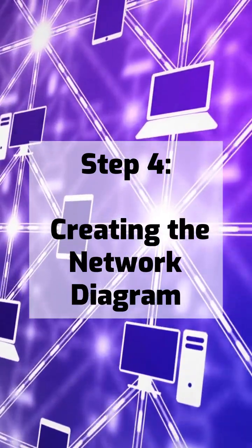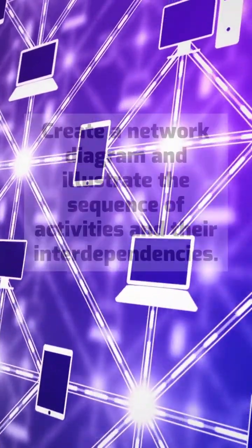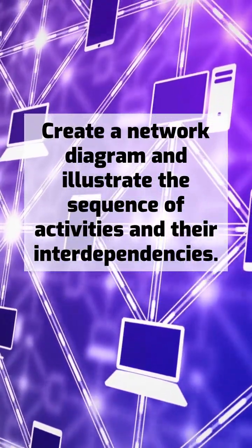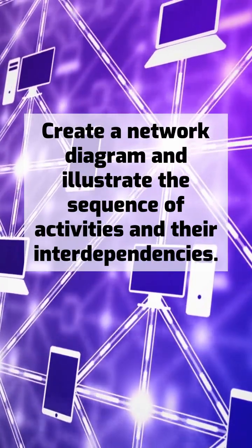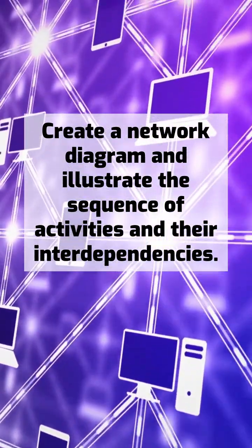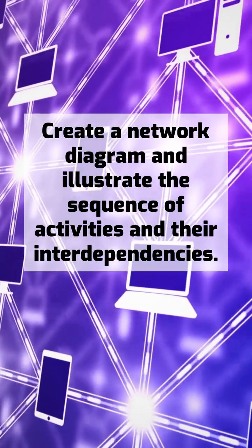Step 4. Creating the network diagram. Using the activity dependencies and estimated durations, create a network diagram. This diagram will illustrate the sequence of activities and their interdependencies. It will serve as the foundation for identifying the critical path.